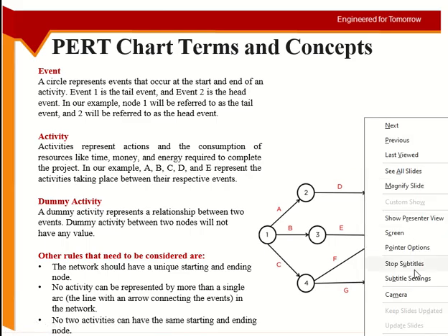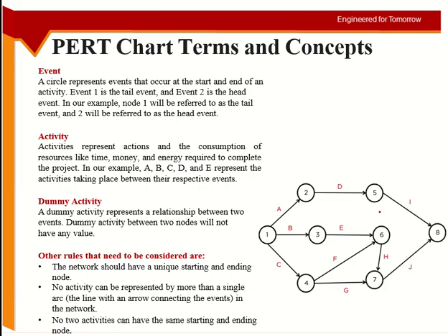So I will make another event here. I'll take E here. So it shows that yes, E end is different, F end is different. But now I know E is connected to H and F is also connected to H. So I separated the end event, but in the end I have to connect them for H. So now this arrow becomes a dummy activity.